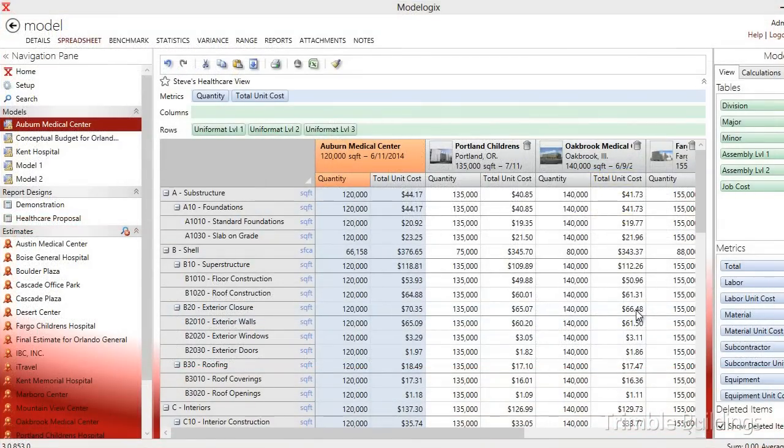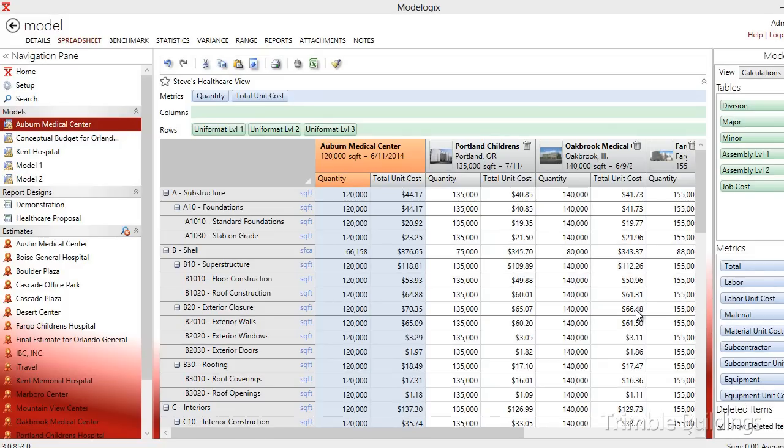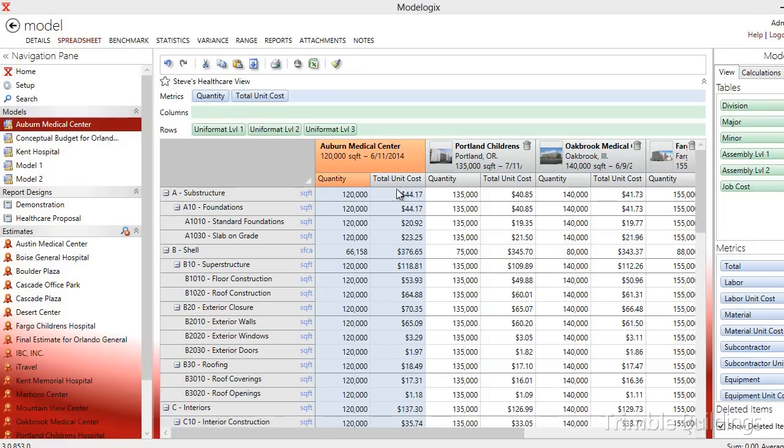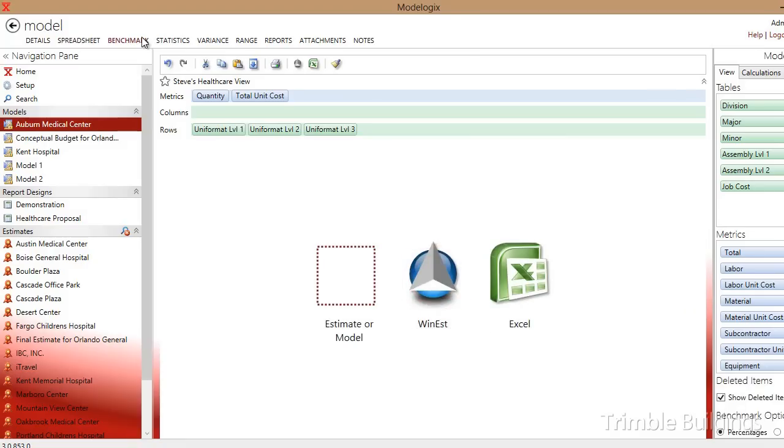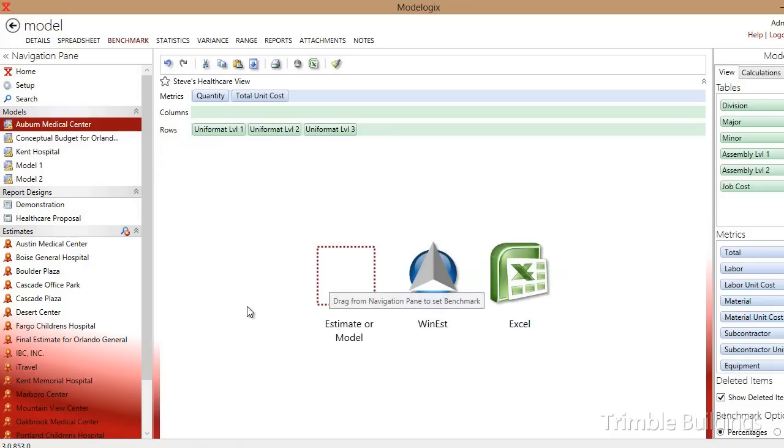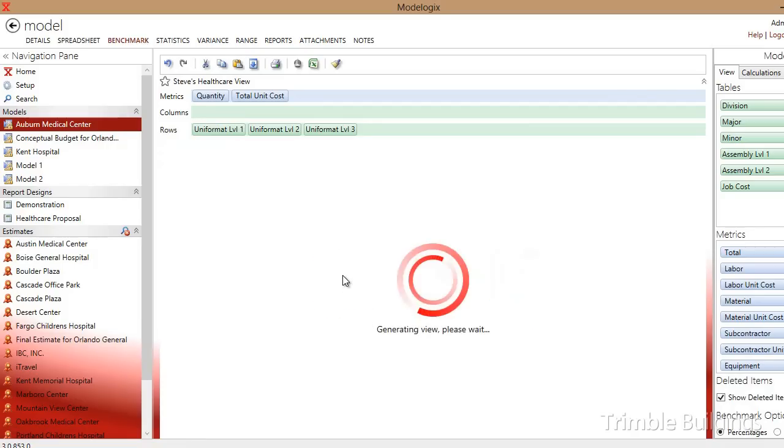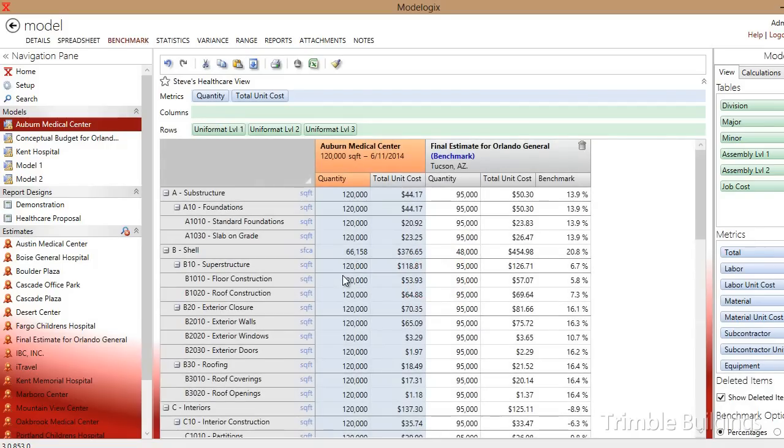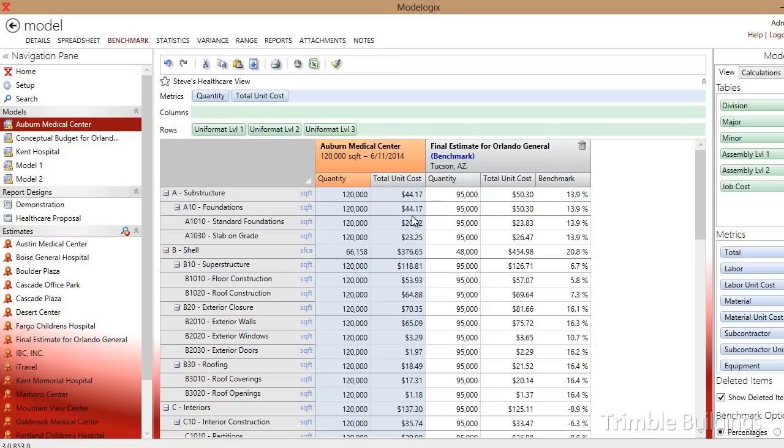Modelogix can not only be used to create the initial feasibility budget, but if you look down the road, Modelogix can also be used to benchmark what's believed to be the final estimate, allowing you to spot variances that are beyond an acceptable range. For example, if I click on the benchmark tab at the top of the screen, I'm asked to select an estimate from the navigation pane to drop into the empty box. My final estimate is for the Orlando General Hospital. I'm going to benchmark that against my cost model of projects of similar scope. Once I do that, I can then move over to the benchmark columns and walk down the percentage differences between my final estimate and a cost model of projects of similar scope, looking for variances that are beyond an acceptable range.